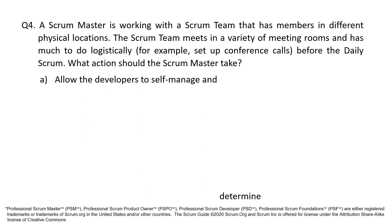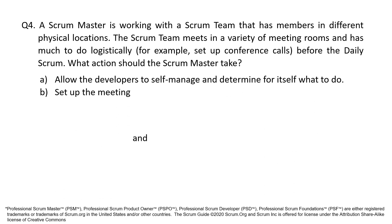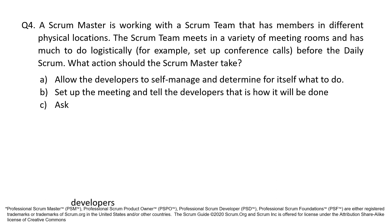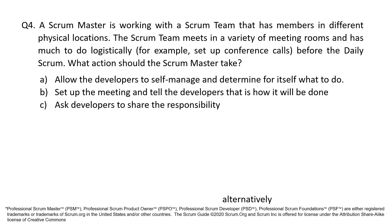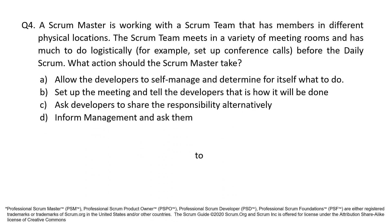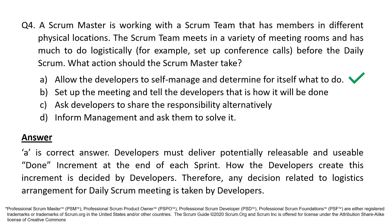A. Allow the developers to self-manage and determine for itself what to do. B. Set up the meeting and tell the developers that is how it will be done. C. Ask developers to share the responsibility alternatively. D. Inform management and ask them to solve it. A is the correct answer.